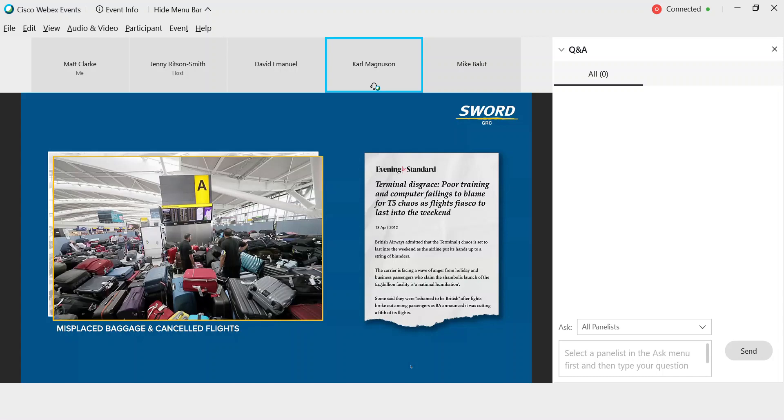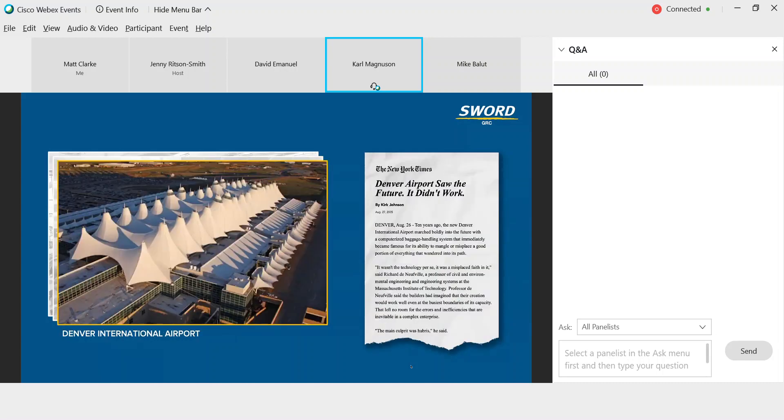There are several contributing factors to the baggage problems, mostly related to IT issues such as poor network access and a bad configuration for the baggage reconciliation system. Interestingly, significant blame was actually placed on not having sufficient time and resources at the end of the project to test systems before the opening. We would argue that waiting to inspect quality at handover time doesn't allow any flexibility to address problems. Instead, quality tests need to be conducted throughout the project.